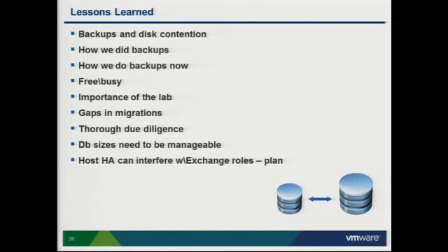You want to do Jetstress. You want to do LoadGen and make sure that you're going to get the IOPS that you need in the lab out of your storage. You also want to replicate in the lab a lot of those things that are unique to your environment, if possible, so that you get to test against them in the lab before you go into production.